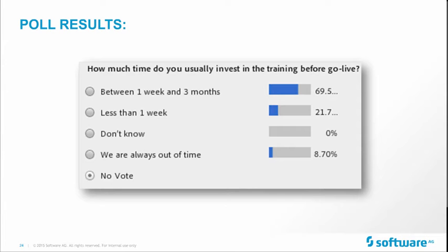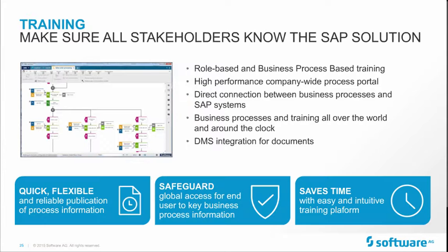That's also one experience that we have, and that's also where we really need to state again that this is something that needs to be planned beforehand, when you're doing the strategy of your SAP project implementation, to plan enough time for the testing so that you can make sure it's all working. So I would always plan already a buffer and just plan more time than we need so that you're sure that you can deal with this. As I was saying before, it's really important that you take your time, that you plan enough time for the testing.